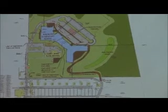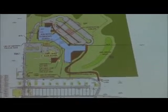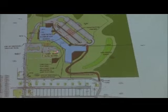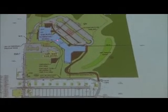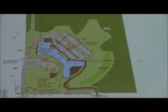The school is going to have a little temporary play area that we're going to establish in front so they can maintain their recess. And everything out front will be undisturbed during this phase of the project. So in essence, the entire new school will be ready to go and ready for the school to move in prior to the demolition of the existing.